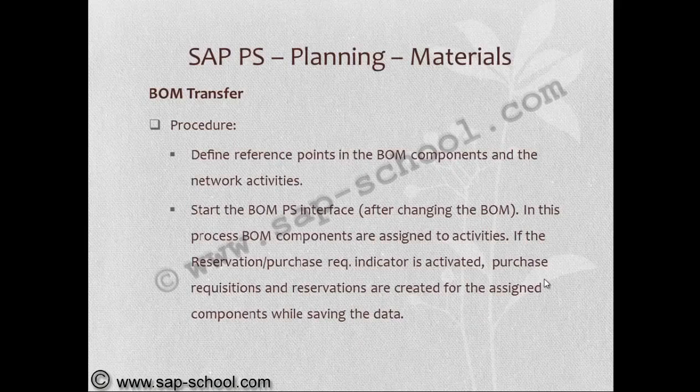Start the BOM PS interface. In this process, BOM components are assigned to activities. If the reservation or purchase requisition indicator is activated, the purchase requisitions and reservations are created for the assigned components while saving the data.